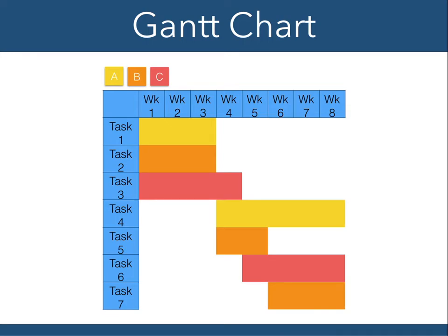So in these simple ones, in a sense, there's comparatively little problem with blockers. Because in that previous graph that I showed, if task 6 couldn't be started until task 5 finished, and something makes task 5 be delayed, well, that's really bad, and it's very difficult to work around. And there is no good answer. You can put more people on task 5, but quite often that can even make things worse because you have to bring the new people up to speed. If it's not just transcribing the Encyclopedia Britannica into a computer or something that someone can grasp immediately and can parallelize over many people, just putting more people into a task doesn't necessarily help.